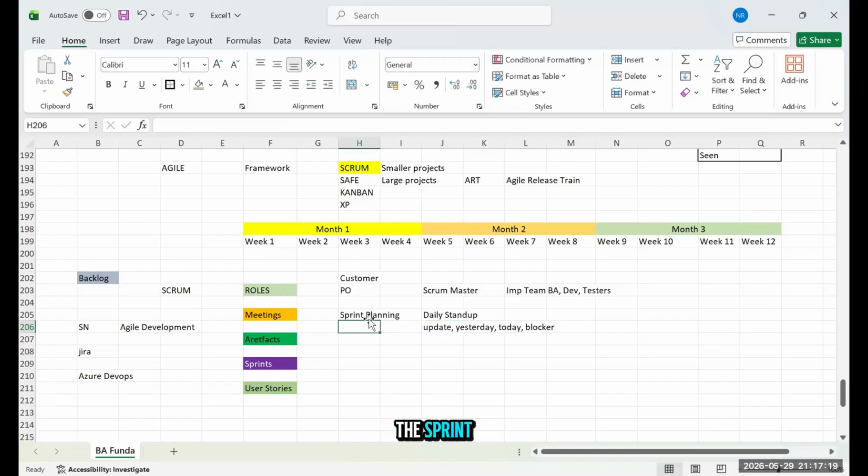Sprint planning usually takes between 30 to 60 minutes, but this happens at the start of the sprint or before the sprint has started. Daily stand-up happens for 15 minutes on a daily basis, not more than 15 minutes. Just a quick checkup. What stories are you working on? Do you have any question? What you're going to do today? What we did yesterday? If there is any blocker, you will discuss that in a separate meeting by bringing in a separate stakeholder. That is daily stand-up.